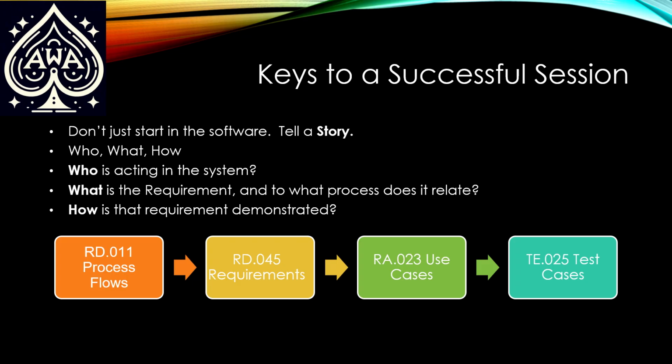What I have here in the video is 4 deliverables. These numbers come from the Oracle Unified Method. So the numbers might be different depending upon your implementation methodology or your systems integrators methodology. The names may be different, but the documents should be the same. So you should have a to-be process flow, whether that is from the Oracle Modern Best Practices, from your process flow that is unique to your company, or whether it's from the customer. Those process flows should tie to a requirement.